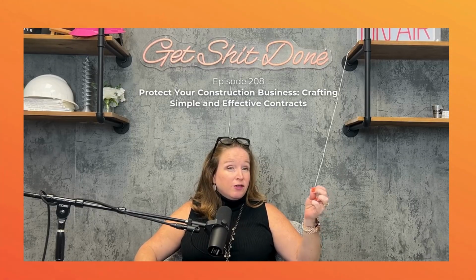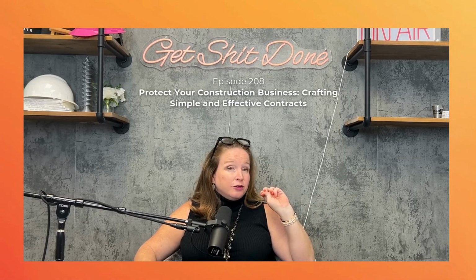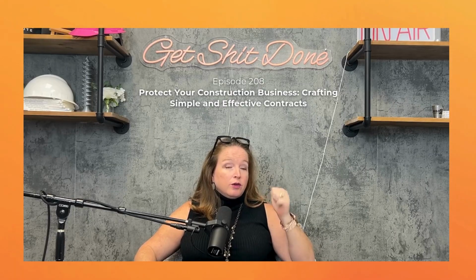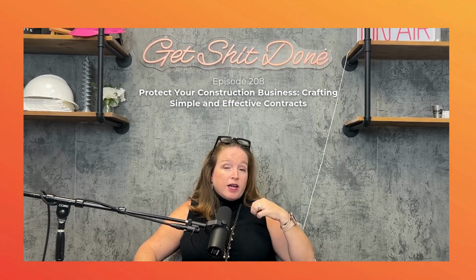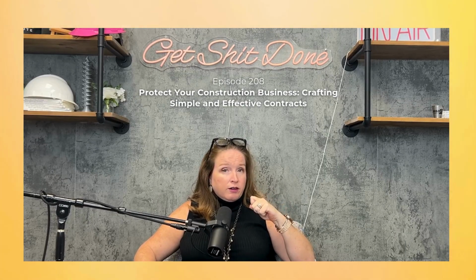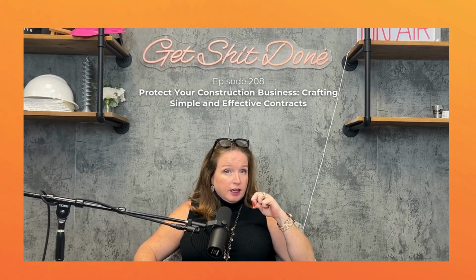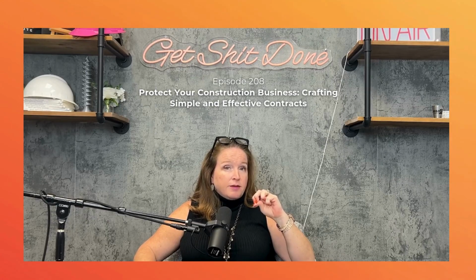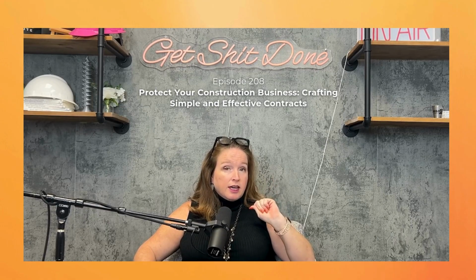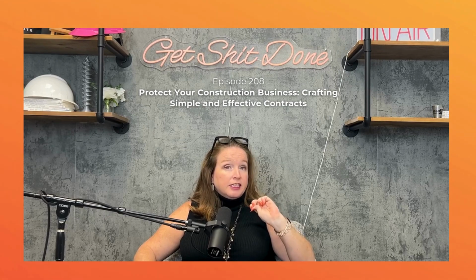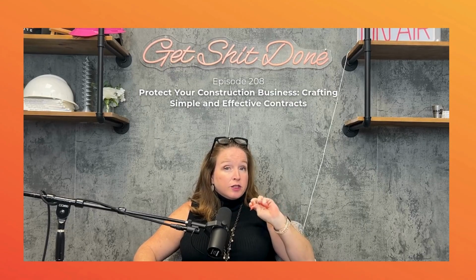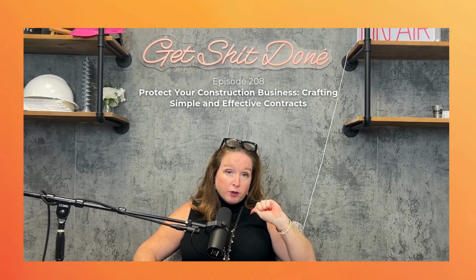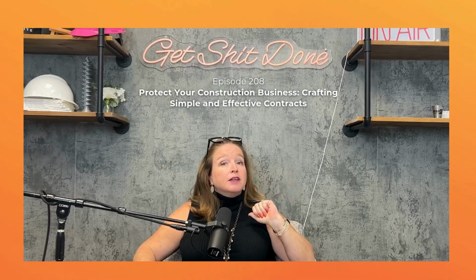Another thing to watch out for is if they send you a change order request, who are they going to send it to and what time frame do you have to respond, right? So I think it was an electrical contractor I represented one time who signed the contract and the estimator's email was in there as the contact point. And the GC sent out a request for a change order because they knew it was going to be a larger scope of work. In the contract, it says if you don't respond within 3 days, you agree it's not extra work. So the email got lost.